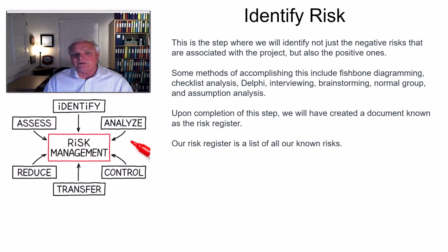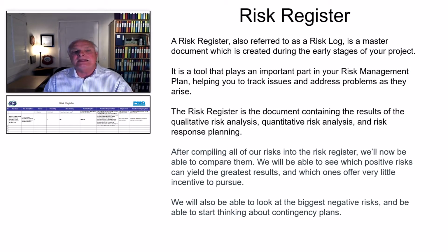You would put those into what we refer to as a risk register. All projects should have a risk register associated with it. That's where you identify not only positive but negative risks, and you create some level of clarity as to what causes them, in addition to how you would react to them, would be the best way to put it. So we've got a PMBOK, or PM Book of Knowledge, PMI risk register that we've provided you, and we're going to ask you to go ahead and fill that out.